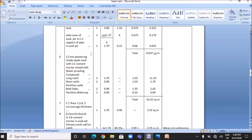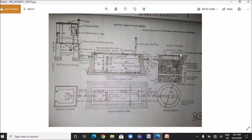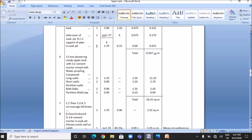The next item is the support of pipe in the soak pit. Its length is 1.5 plus 0.1 plus 0.1, totaling 1.7 meters. Breadth is 0.15 meters and height is 0.06 meters. Quantity is 0.015 cubic meters. The total quantity involved in RCC work in the septic tank and soak pit is 0.507 cubic meters.